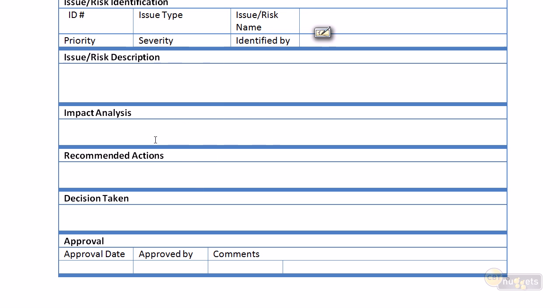This is the working paper to be maintained for each issue, risk, concern, off-specification, and we're going to go through a very detailed description, and we're talking paragraphs of information here, not a quick summary into the log. The impact analysis, again, is going to be very detailed. Here is some very thoughtful review of the issue or risk. Here's the impact analysis. Here's the recommended actions.